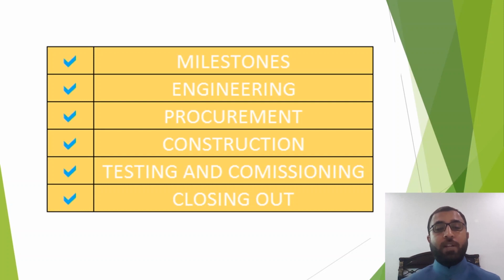Then you need to plan engineering, the whole design process. You need to include their durations and their relationship with the construction activities in the baseline schedule. If it's an EPC project, definitely you are going to design it. You need to get the concept based drawings. When the client will provide these drawings, what are their dates, what are their durations, you need to mention it and plan it. So this is part of the planning. The design is part of the planning.